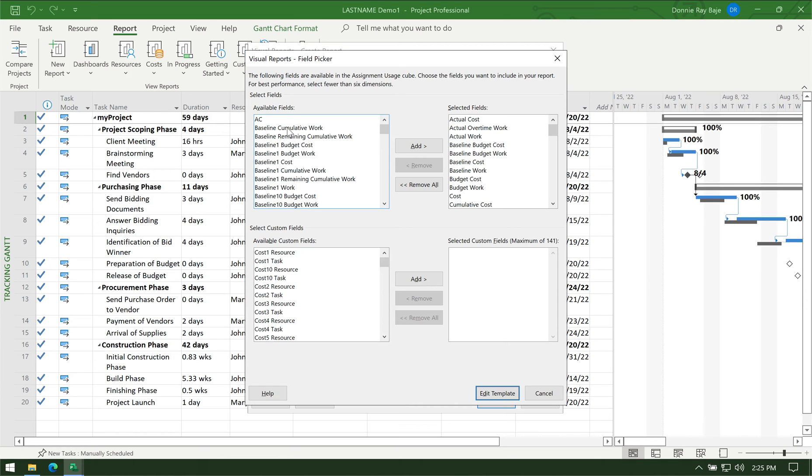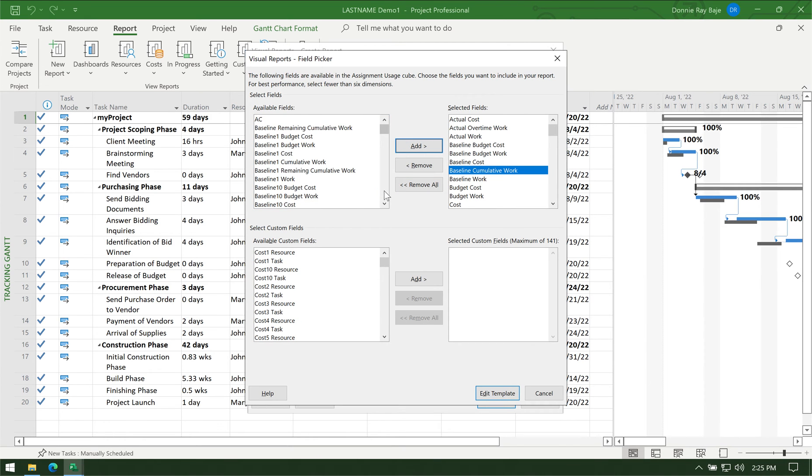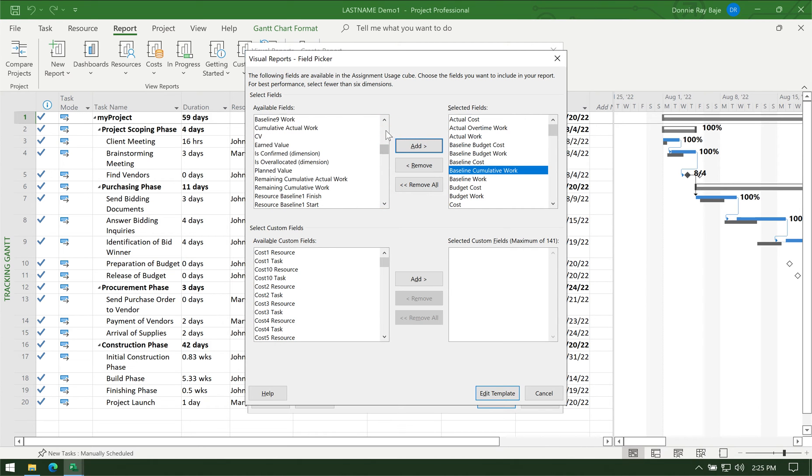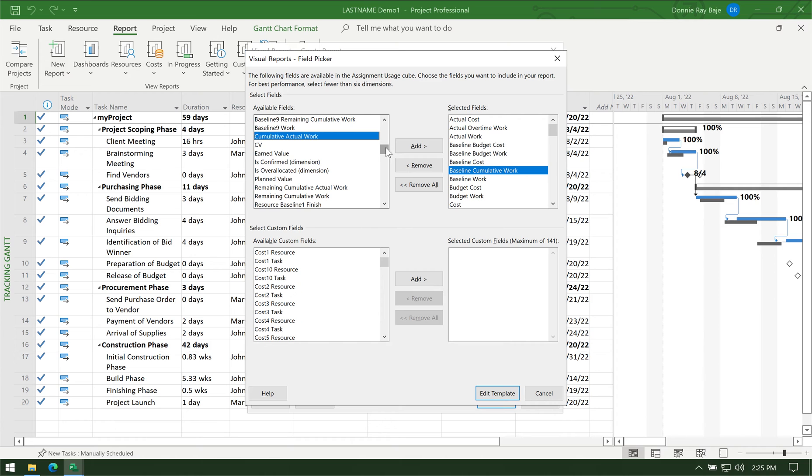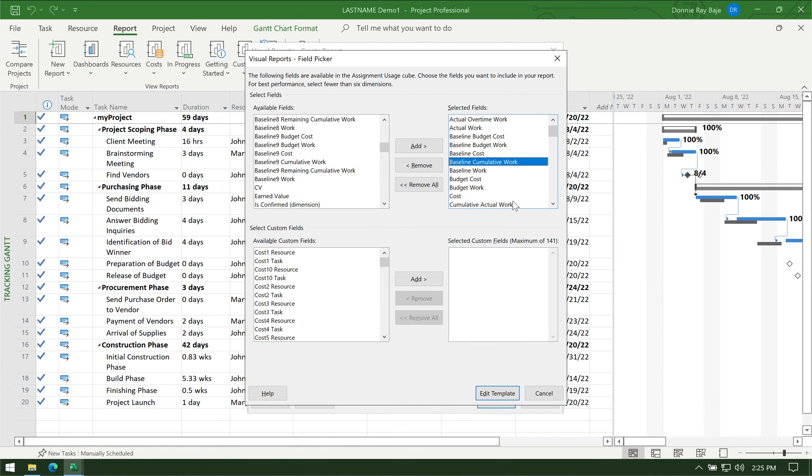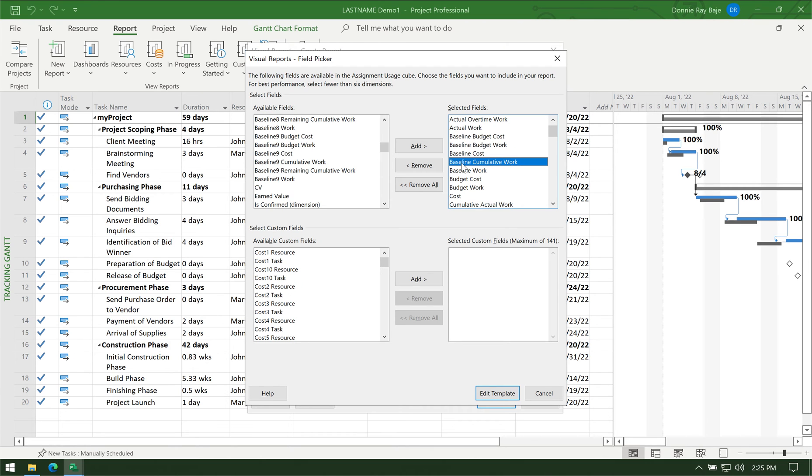We have to add the Baseline Cumulative Work and then click Add. We also need the Cumulative Actual Work—it's alphabetically arranged so you could just look for them. Once you've added both the cumulative fields—the baseline cumulative and the cumulative actual—you then click Edit Template.